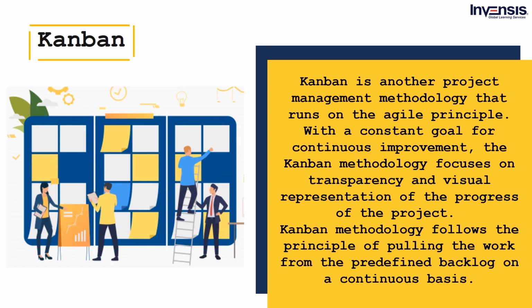The work is then arranged on a Kanban board in different stages where everyone can see the progress of the project or a particular task, with one of the advantages being a visual representation of the progress of each task. The other significant advantage of using Kanban methodology in project management is that it will give an exact representation of any shortcomings as well. The WIP limits, or work in progress limits, ensure the prevention of any potential bottlenecks, where one can put a limit on a stage.